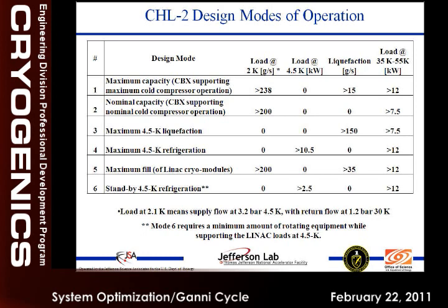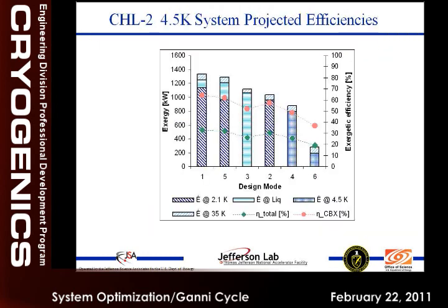And these were all not looked at in the original CHL1, so we had to figure out the path when we were commissioning CHL1. It took many, many years to figure out all those things. And because we knew all these things, at SNS we were able to commission in 2 weeks, and we want to make sure we continue what we learned into all these.